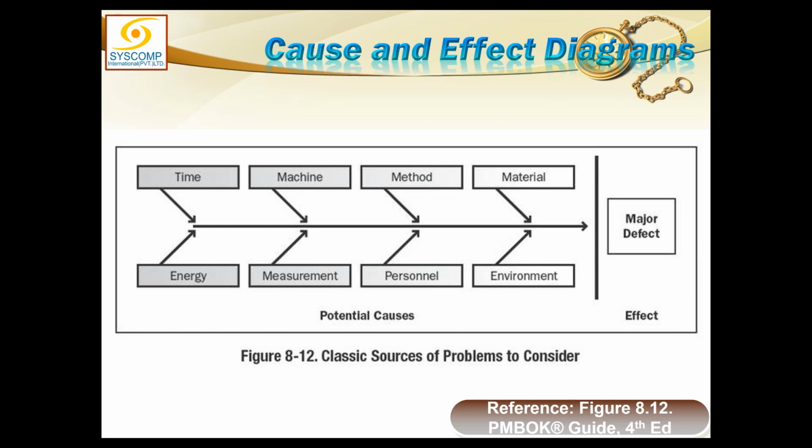First of all, you determine which to blame. For example, you say this is the fault of the machine. Okay, fine. Then dig down into the machine, find the bones within the machine and try to pinpoint which machine. You will open up the machine and list down all the machines which are there and try to pinpoint the machine which could be responsible. Then you will open up that machine and find the part of the machine which could be causing the problem. And ultimately, you will reach the level where the problem can be fixed.